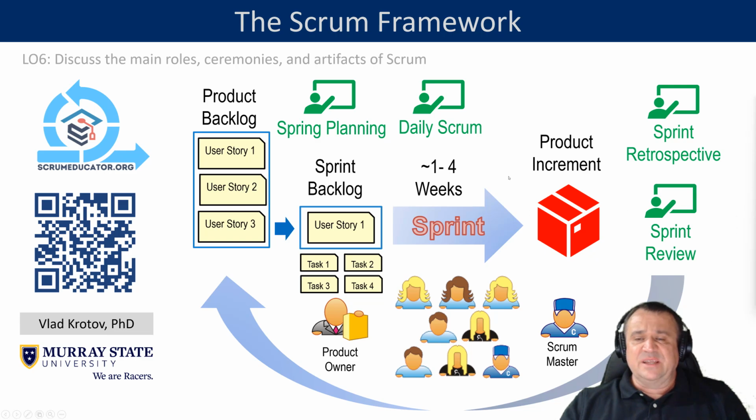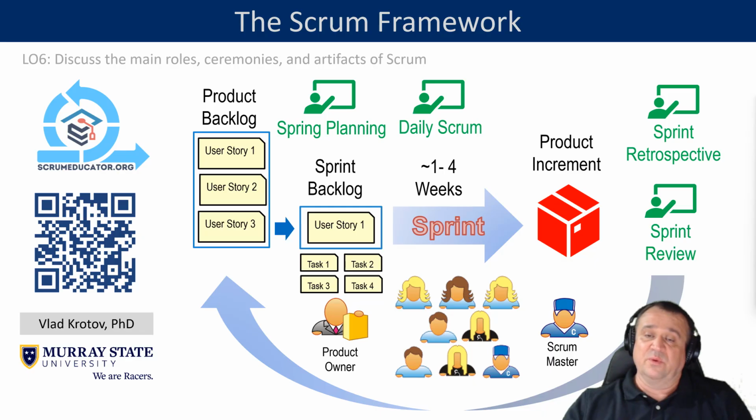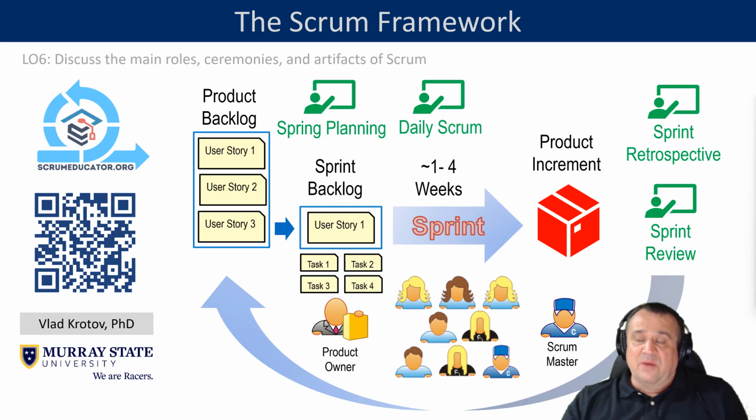Now, by the way, daily Scrums are not for doing actual work. They're really more for touching bases and staying in touch with the rest of the team so that everybody knows what other people are doing, and for the Scrum Master to see what people are doing, what's their progress, what they did yesterday, what they're planning to do today, and whether they need any help, right? If you need a detailed collaboration session, then you schedule that meeting outside of the daily Scrum.